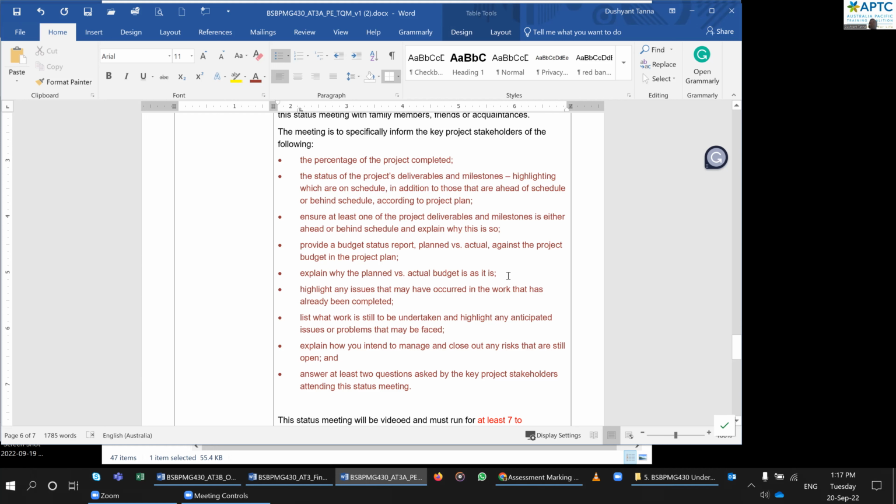I mean, this is what in real life is. What do you tell your stakeholders? Guys, we are running a project. It's great that we have completed this much, but there's only a bit that still needs to be done. We had 50,000. I was planning to spend 40. That would have left us 10,000. But unfortunately, the labor charge has increased because of inflation. People are charging more, and so on. So I spent 43,500. So now I'm only left with 6,500. But still, rather than 10,000, I still have some money, so I don't need any additional money. So you're talking about the budget, right? What actual budget was, and highlight any key issues and everything. So this is what your script should be.